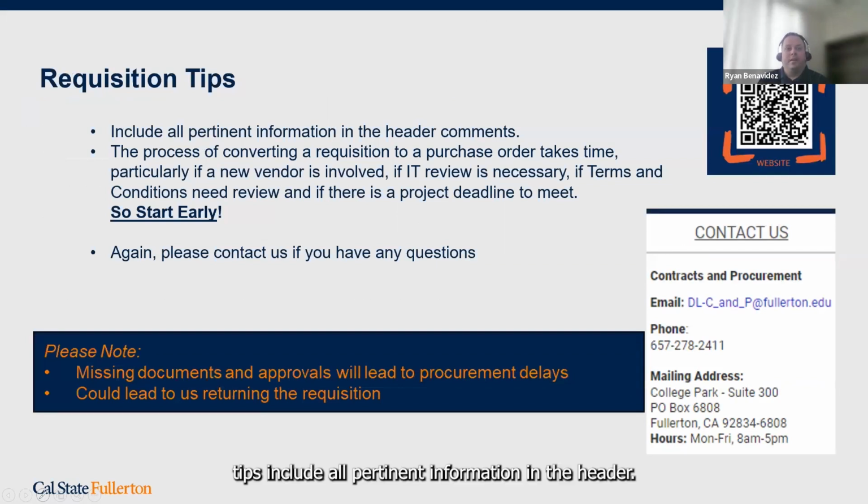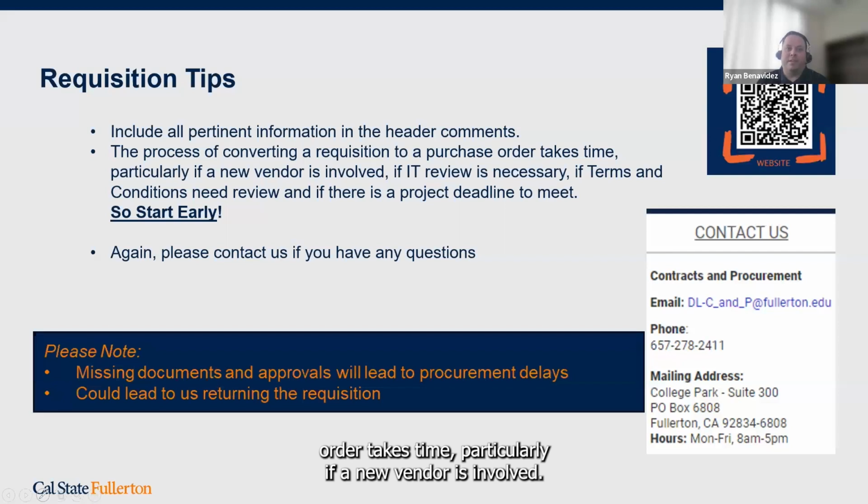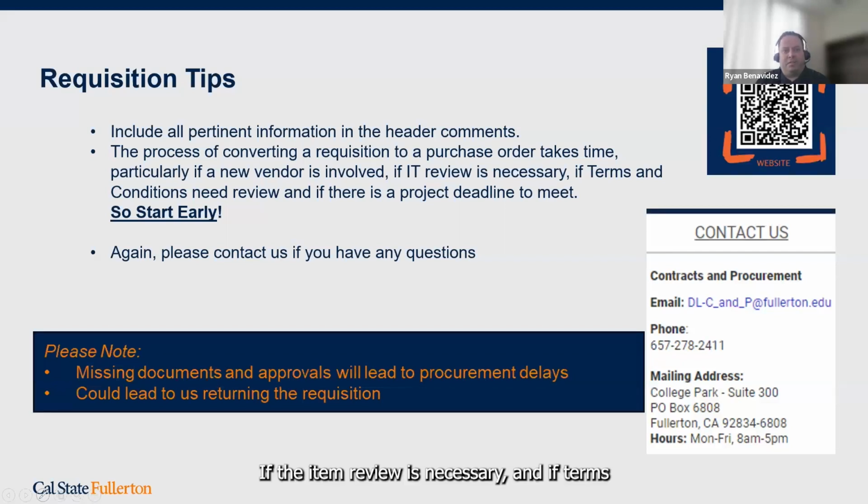Requisition tips. Include all pertinent information in the header comments. The process of converting a requisition to a purchase order takes time, particularly if a new vendor is involved, if an IT review is necessary, if terms and conditions need a review, and if there are project deadlines to meet. So start early, and again, please contact us if you have any questions.